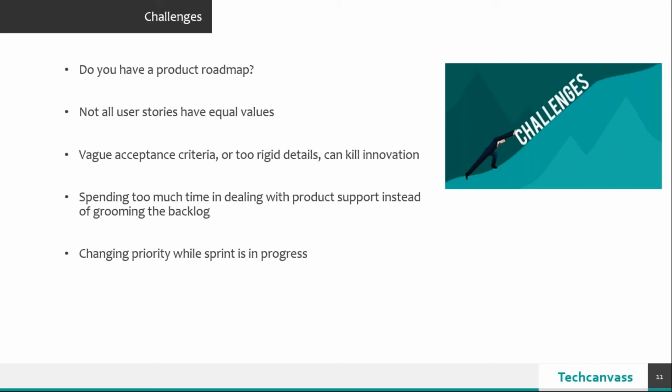And T, so you need to write down the acceptance criteria or the detailing of the stories wherein it can be easily testable. So the testing team can easily write down their test scenarios based on the information provided in the story. So you need to keep certain things in mind while you're writing user stories.